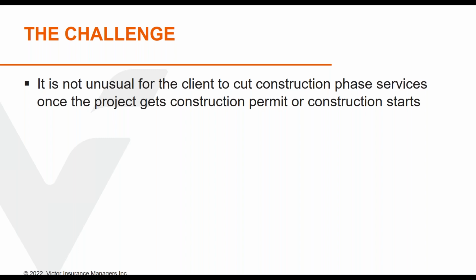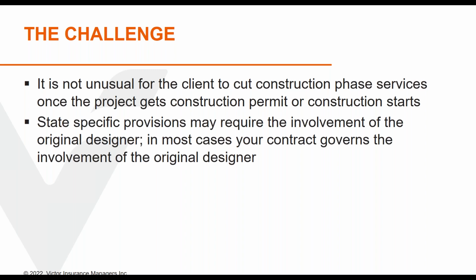And the thing that you need to understand is that there may be state-specific provisions that may require the involvement of the original designer, and some states do require that you be involved as the designer of record, but you would have to find out if that's the case in your particular situation. But in most cases, your contract governs the involvement of the original designer.